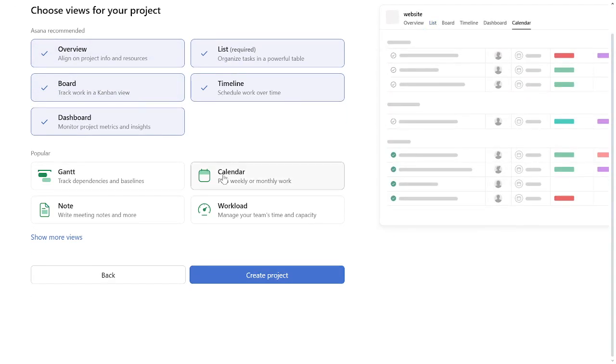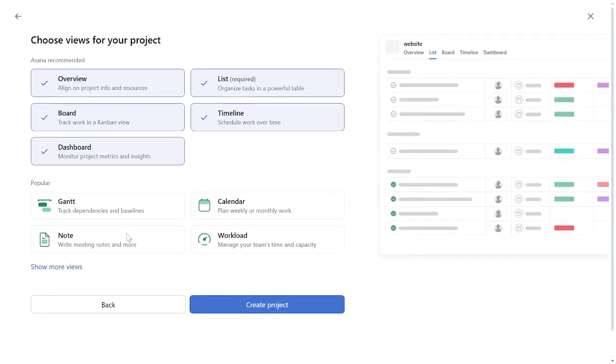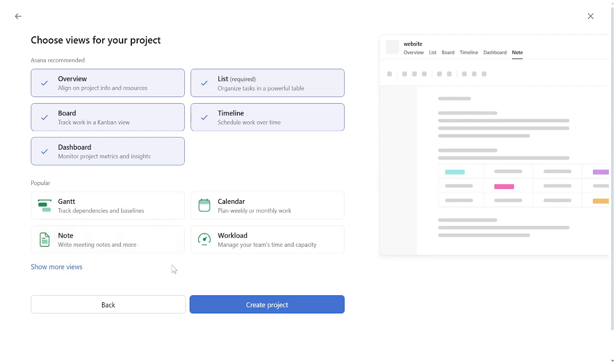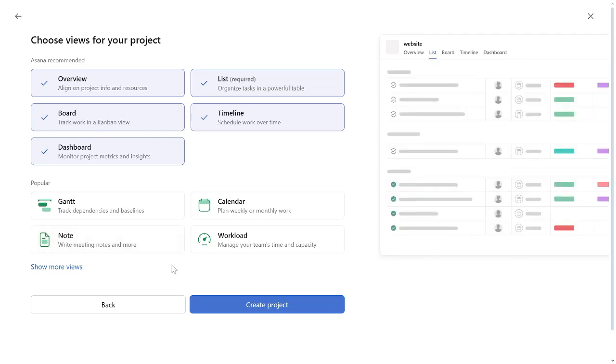With the template in place, it's time to create sections. To do this, click on the Add Section button and name your section. This helps us because sections act as milestones or phases in your project. They help organize tasks and keep everything neatly categorized.